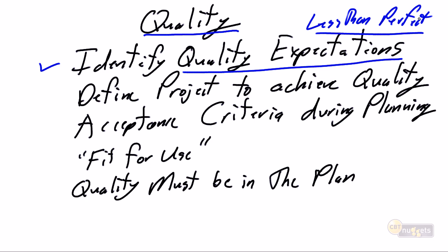And we continue to do our inspection, and we find a couple of paint chips in another bedroom, and we find a missing drawer pull in the kitchen, and we find maybe a total of 10 of these very minor flaws. We're probably again going to accept the home, and we're going to call up the movers and say, move me in, but we're either going to just turn a blind eye to them and say, I'll fix them myself, or we're going to put that conditional acceptance in and say, you must fix this very quickly. And that's what I say, we're identifying the quality expectations. We will allow the project to conclude if it's less than perfect.